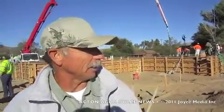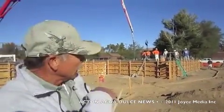Now, the footings there, you don't see on most buildings. These are elevated. There's about 4 foot down on the ground that you don't see, and then there's 5 foot up for the flood. This is kind of the end of a floodplain, so it's higher than normal. So we're going to end up being about 3.5 feet out of the ground after we're done. And then you were saying that this fill around the edge, you're going to push that back up so it doesn't look so elevated. Yeah, it won't look so metropolis, but it will definitely dress it up nice when we get these forms off.